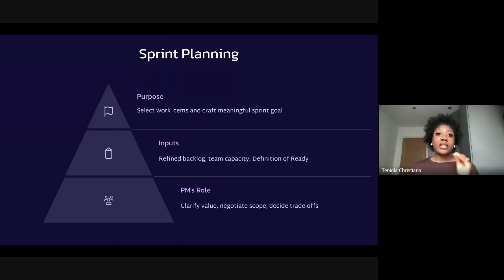One thing to mention is that as a PM, you should come to the sprint planning sessions with tickets ready. And I will go into that in a little more detail a bit later, but your tickets should be ready. You should have spoken with your design team or a designer within your team, lead dev or something, or QA, and you guys together talk about those tickets, refine those tickets, make sure they're ready.